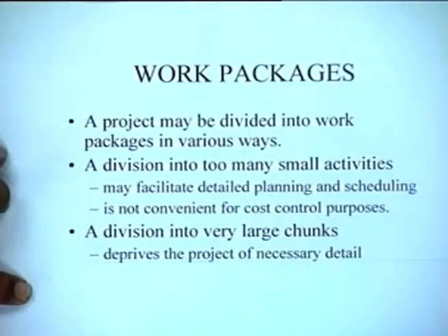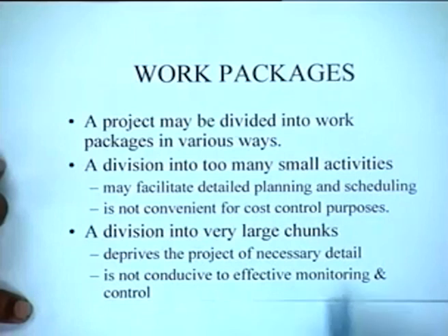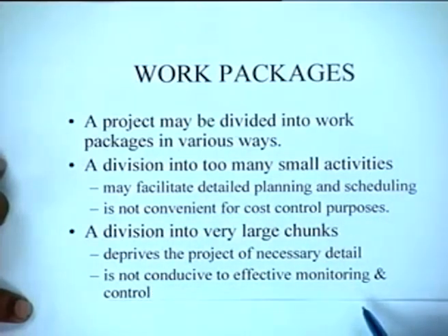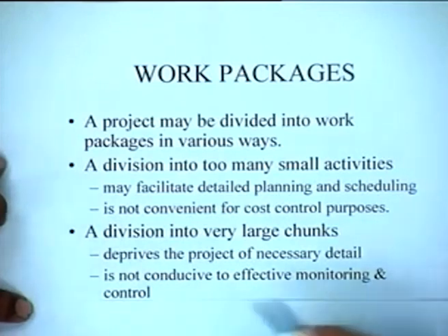So it deprives the project of necessary detail and is not conducive to effective monitoring and control, because there are no stages, there are no parts where you can check. You would like to find out, okay, the project has 15 parts, we will check each part, and at the end of 2 parts we should be able to say yes, so much, 2 parts are over or 3 parts are over. So in that sense, large chunks also are not necessary.